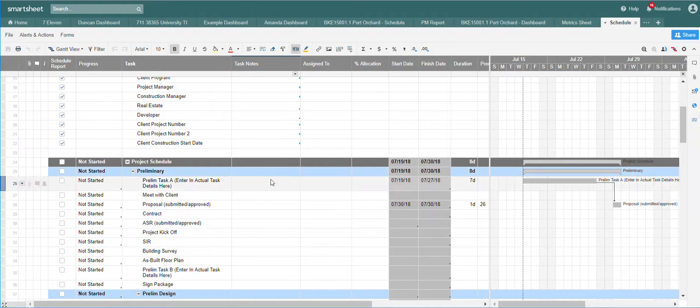If you're working on this for a very specific program and you have repeatable actions, repeatable tasks, and you happen to utilize the same people for those tasks, or have similar durations of time, then it will really save you a lot of time to populate this template as much as you can from the get-go, because this will be the basis for all your projects. Then when you actually create 10 projects, you'll have a lot of the work done for you, and you only need to come in here and do some modification.